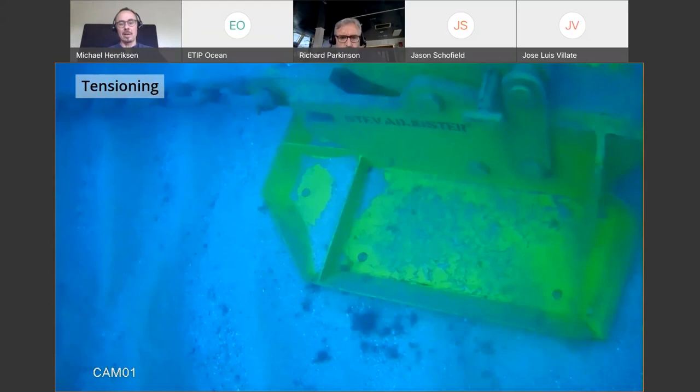Which was also discussed before, then this, some special equipment. This was a step adjuster from Firehawk standing on the seabed where we can pull a chain through to tension the system. It got more complicated because it's difficult to do when everything's on the seabed doing these things. We manage, but it's something as a learning that we don't want to do this the same way next time.